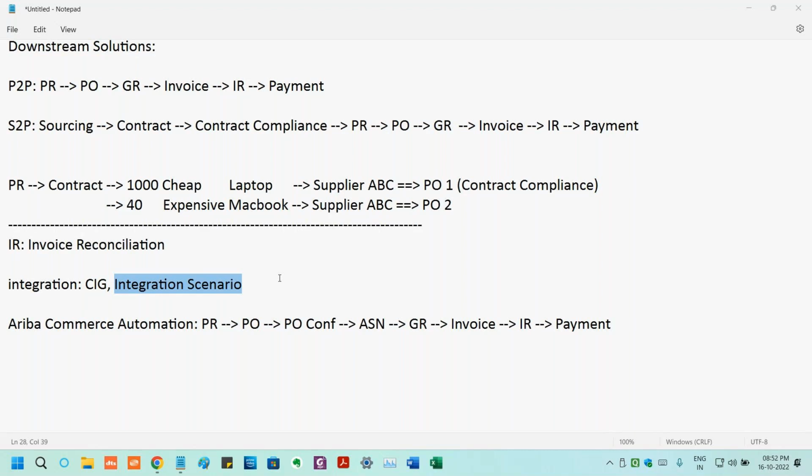Yes, the implementation role is the same as for a functional consultant in any SAP module; the same thing will be there in Ariba. We have to conduct a requirement workshop and prepare the as-is, to-be and gap document. Then we start building the solution and do the configuration, do the unit testing and integration testing, perform the UAT with the client, and then work on the data cutover activities and work on the go-live.